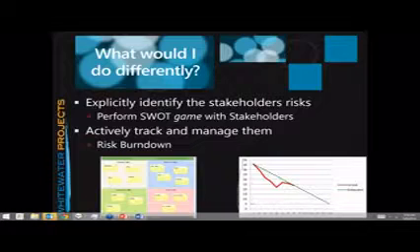So here we've got 45 days worth of delay using that method. And as we incrementally go through iterations here, iteration 1, 2, 3, 4, 5, you're able to burn that down because you're delivering some of that product. Does that make sense? I hope.